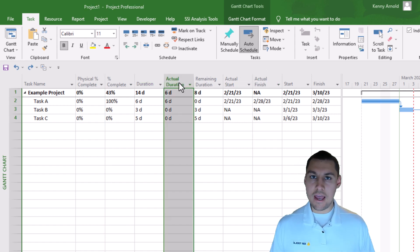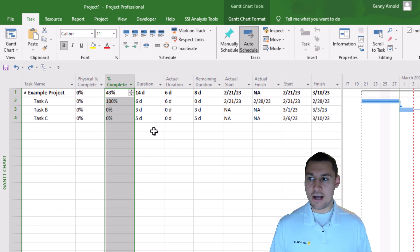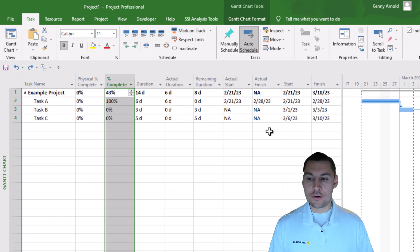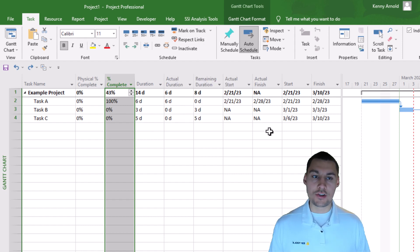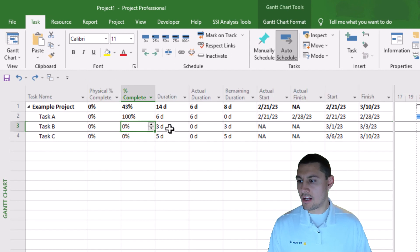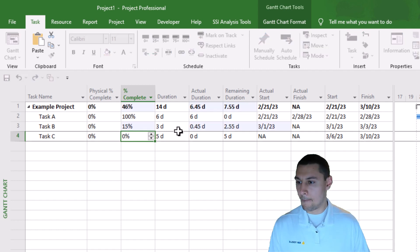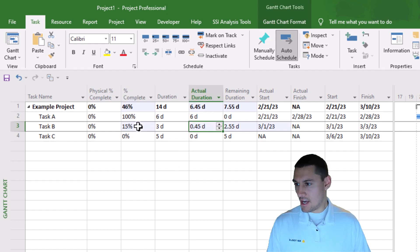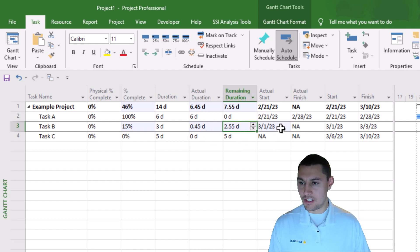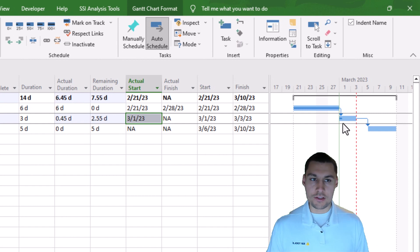Because of this, you never want to manually enter a value in the percent complete field. Instead, you want to let Microsoft Project calculate that for you by using the mark on track button after you've worked with your team to figure out the new start and finish dates of the task. Let's focus on task B for a second. Right now task B has a percent complete of zero. Let me show you what happens when I change the percent complete from zero to 15. Notice that as soon as I enter that 15%, a value is automatically put into the actual duration, remaining duration, and actual start fields by Project. There's also a progress bar running through the task in the Gantt chart representing the percent complete.